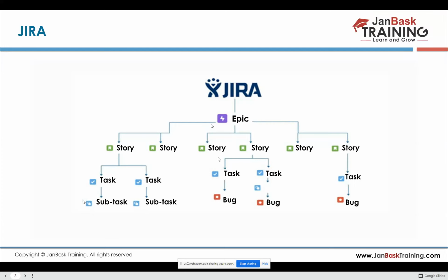Yeah, I understand it as parts of a project. I mean, the different stories are different parts of the same project, right? Yes. So basically, the epic will have all the feature related data, what the team is going to develop for the next 3 or 6 months, and then it is divided into different stories according to the feature. And then the story is divided into tasks and subtasks.